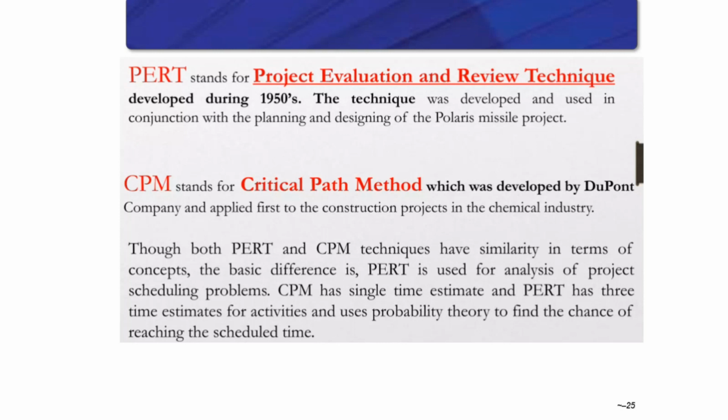PERT involves creating a project network diagram that includes all the tasks, durations, and dependencies. It's similar to CPM, but it's widely used when durations, starting or ending times are highly uncertain. It also uses a diagram to develop a calculation to identify the most efficient path in project allocation and management.